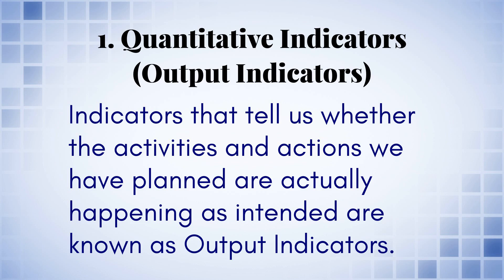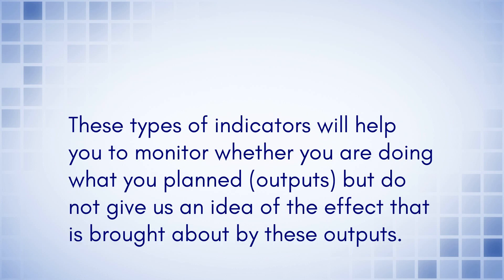1. Quantitative indicators — output indicators. Indicators that tell us whether the activities and actions we have planned are actually happening as intended are known as output indicators. These types of indicators will help you to monitor whether you are doing what you planned in terms of outputs, but do not give us an idea of the effect that is brought about by these outputs.